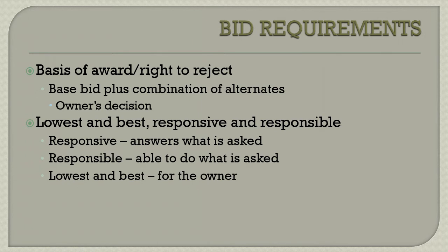On one occasion, I had a project where we selected the second low bidder because the project was being funded by state grants, and the way it was priced, the second low bidder, which was only $700 more out of a $90,000 contract than the low bidder, actually allowed the owner, the municipality, to use less of its own money and maximize the use of the grant.